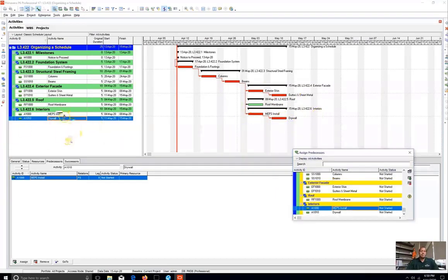You can start linking before your whole schedule is built. But the way I like to do it is just how I did right here, is go ahead and add in all your activities first. I haven't even touched durations yet, and I don't really like to until the point I'm at right here. So go ahead and add in your activities. Once all your activities are done, or close to being done, then go ahead and link. And once our linking's done, I like being able to see, on this right side, a pretty good looking schedule. So from here, I like to adjust.